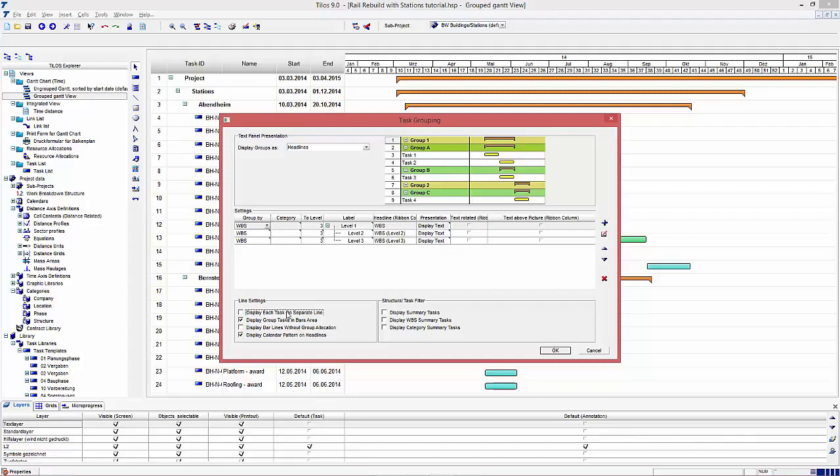line. If they are not overlapping at all, just one line with all related tasks aligned is created. If the tasks are overlapping, the system enlarges the height of the line and displays all related tasks. This presentation minimizes the space for displaying related tasks in a group without losing details.